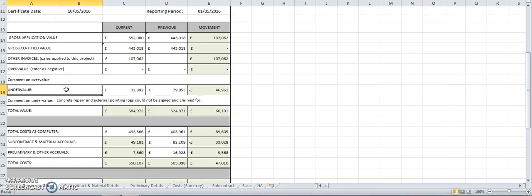and unfortunately your subcontractors have carried out the work, the value is there, but they haven't produced the NICI cert. It could be a client requirement, or an employer's requirement, that the NICI cert has to be filled out, completed, and issued to the client prior to receiving payment.